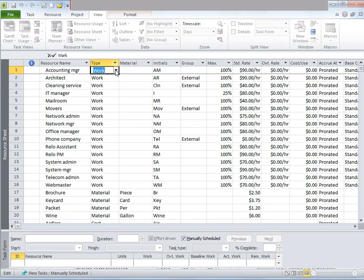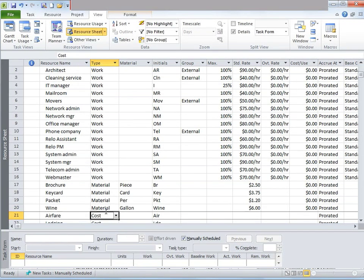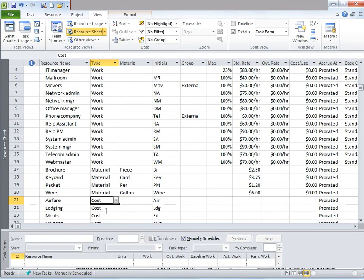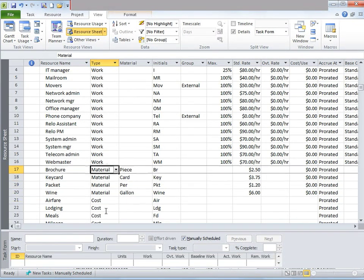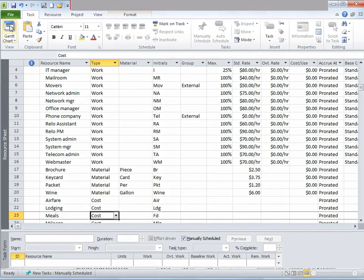Work resources are most used — it is anyone who works on the tasks such as people and equipment needed for completion. Cost resources are associated with financial costs incurred for a task — essentially expenses such as travel, entertainment, airfare, and so on. A final type is material resources, which are consumable, assumed to be in unlimited supply, and used up as the project proceeds. For example, an IT project needs cable, a printing project needs paper, and a construction project needs steel or concrete.